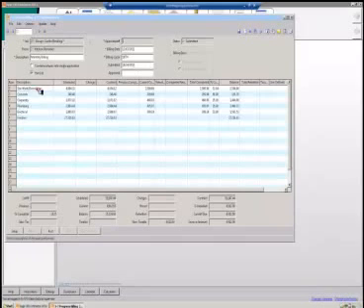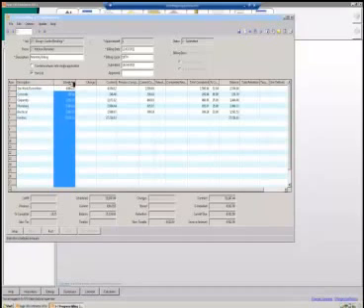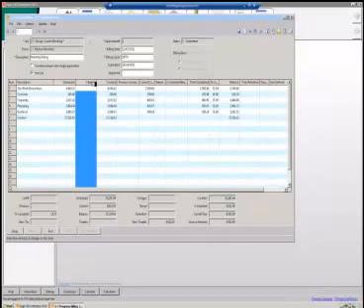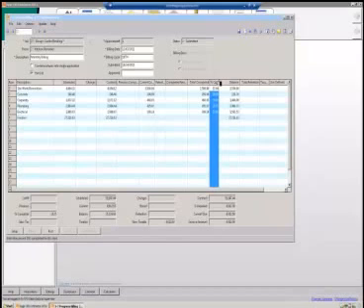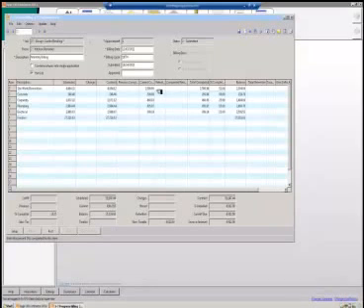These are our schedule of values line items, and these are typed in as descriptions, but we could also pull these in as cost codes. This is the value that we negotiated with the owner. I have change orders, and I can either add change orders as a separate line item down here, or I can add them to the respective line up here. It's up to you. Since this is application number 1, we can either enter in this column what we want to bill, or we could enter over here what percent we want to bill. Some clients like round percentages, some clients like round numbers. Either way, it works.